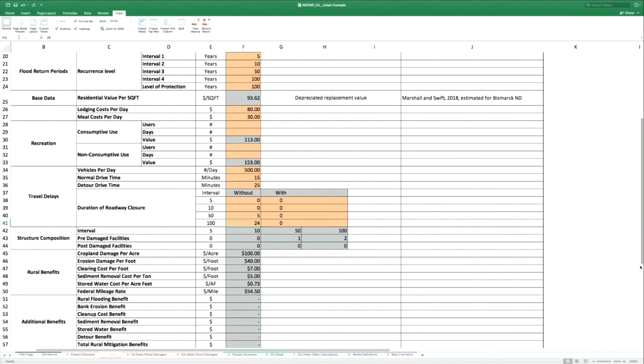I worked on a hurricane protection system in New York after the Hurricane Sandy work, as part of the post-recovery flood work. One of the things that came out of a lot of studies by both Health and Human Services and New York and FEMA was that a lot of the flood-related accidents and fatalities weren't directly related to floods. They're indirectly related. With a flood, you have a power outage, you lose a substation, or you lose some connection to the electrical grid, and power goes out.